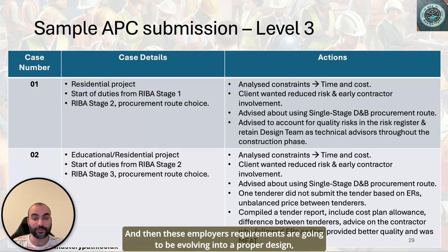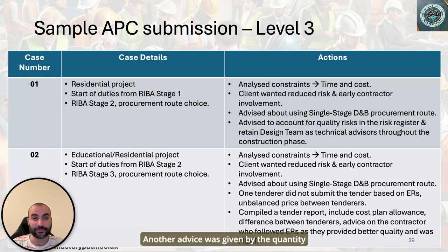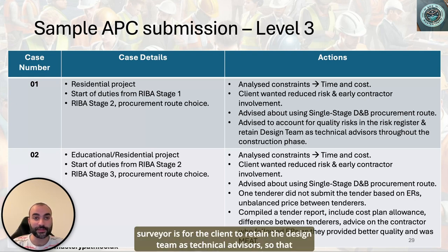And then these employer's requirements are going to be evolving into a proper design that is going to be constructed by the contractor. Another piece of advice given by the quantity surveyor is for the client to retain the design team as technical advisors so that they could review the design that is crafted by the contractor. The design team could be technical advisors also throughout the construction phase.